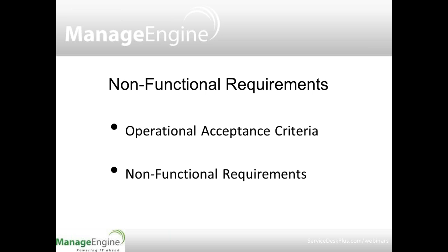Now, that's at the input end. The output end is another phrase, the operational acceptance criteria. If we do what I'm saying and get more formal about operational acceptance testing, we should define what the criteria are. What does the hole look like that you've got to poke the system through to get it into production? And then we should make sure that the non-functional requirements at the design end meet up with the operational acceptance criteria at the output end.